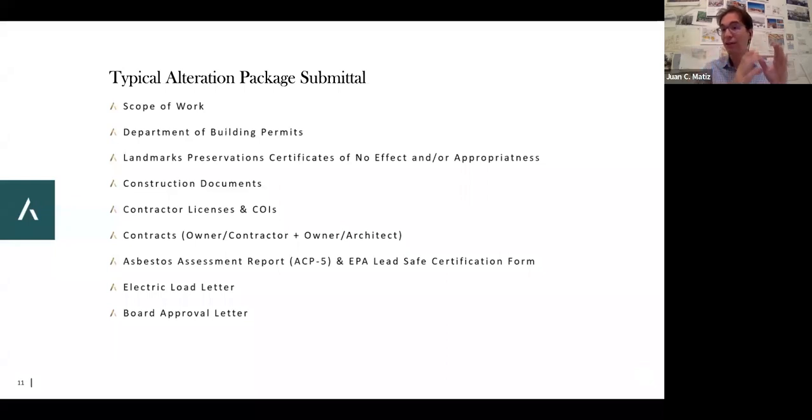because I've had to actually advise clients on trying to help them define what is completion of project, and can we paint after 120 days? Because sometimes people are doing a lot of work and it does take time to get things in and out of a building and the elevators, or figuring out how much you can do before the permit actually is triggered, right?